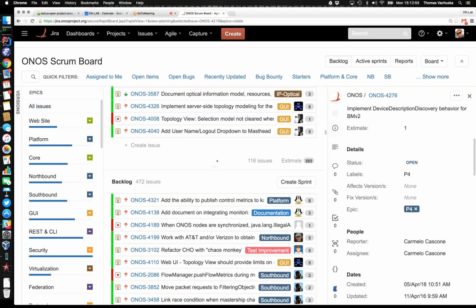First of all, the buckets are ginormous, and it's difficult to do, and the work is made up from work being done by probably close to 8 to 10 teams. Different teams use the tool differently, and some don't update the tool as they should. So this basically spoils the game for those that update it and for those that do look at the burn down chart.